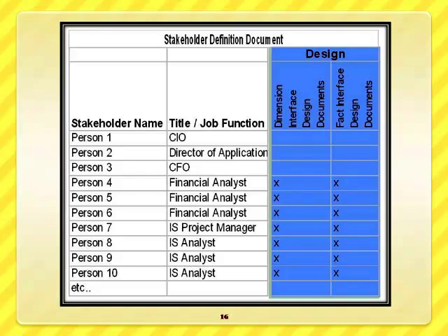Similarly, for the design stage, design is mostly a technical job. Therefore, the top people need not be involved. Functional analysts, financial analysts, information system project managers, IS analysts, these are the people further down who need to be involved in the project. Similarly, construction is again a pure technical job, therefore only the information system analysts are involved in this case. Testing. While testing the system, we again need to involve the technical people as well as the business people. Therefore, we will be involving some of the financial analysts, the project manager and the system analyst.